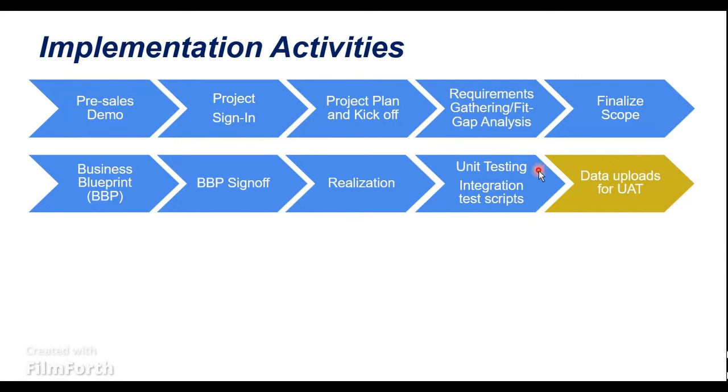As for the unit testing, it can happen in development, not the golden client, but a test client. Again, it varies from company to company. A few people say they would like to do the unit testing in the quality system but not in dev, and a few others create a different client in the dev itself and do the unit testing there, just to avoid multiple transports being imported between dev and quality. Once the unit testing is completed and the test scripts are done, we go with the upload of data for the user acceptance test.